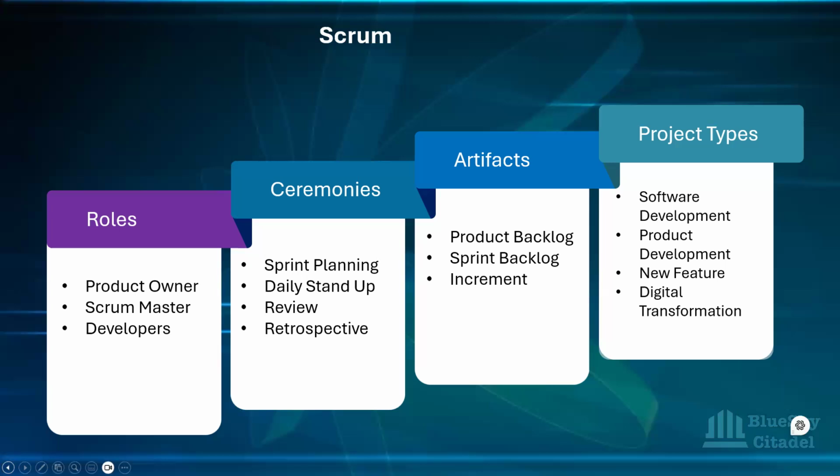And then quickly, we want to look at the artifacts that you have for the Scrum framework. The first one is the product backlog. It is a prioritized list of features, enhancements, and it could be bug fixes that the team needs to work on. Most times on Azure, it's the one you have as New. Some teams actually change that name to product backlog, maybe for the team members to understand. But any column that is New, that is the product backlog. That is the one that has a list of everything that needs to be done.